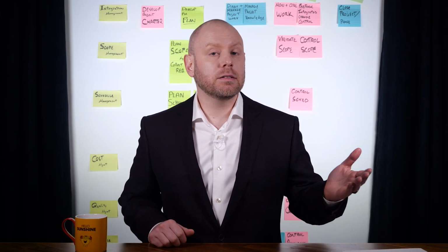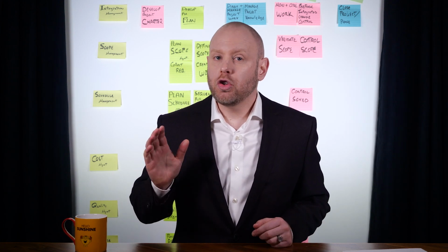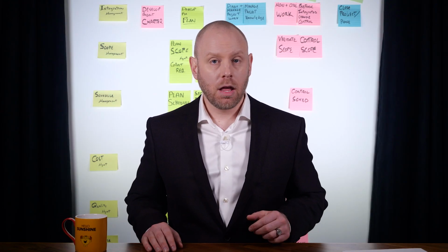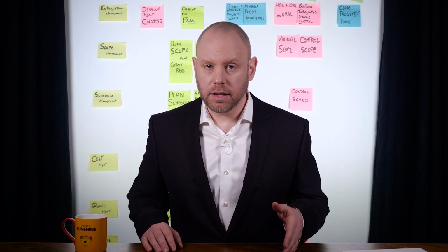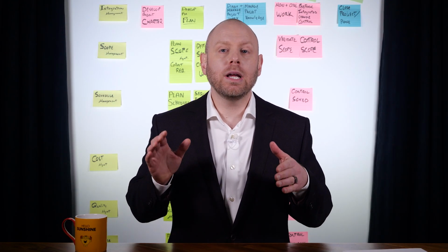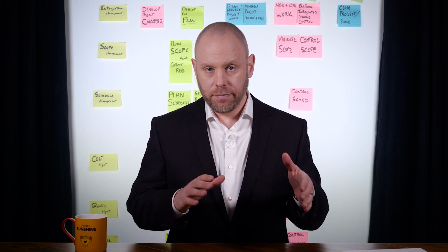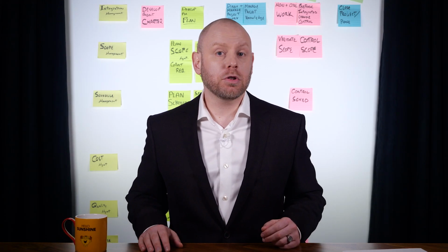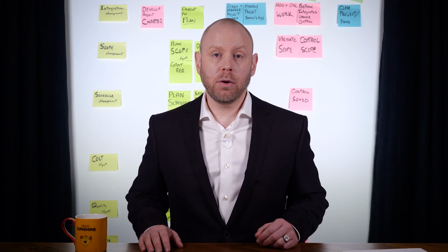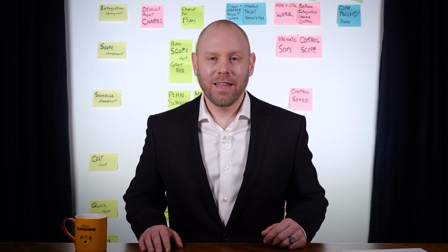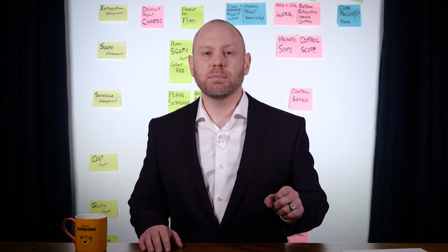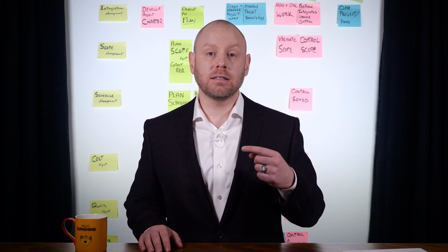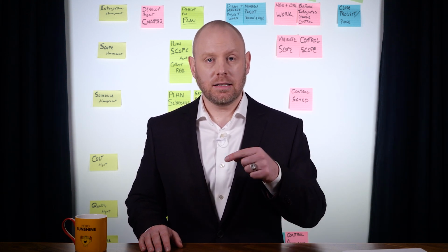Urgency, proximity of risk to impact, dormancy, or time before the impact is discovered from a risk, manageability, controllability, detectability, or how easily is the risk recognized, connectivity, how related is one risk to other risks, strategic impact, and propinquity. That's a word you don't hear every day. It's the degree to which a risk is perceived to matter to one or more stakeholders. Where a risk is perceived as significant, propinquity is high.